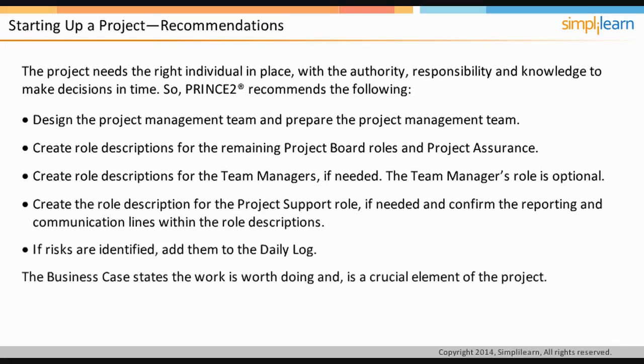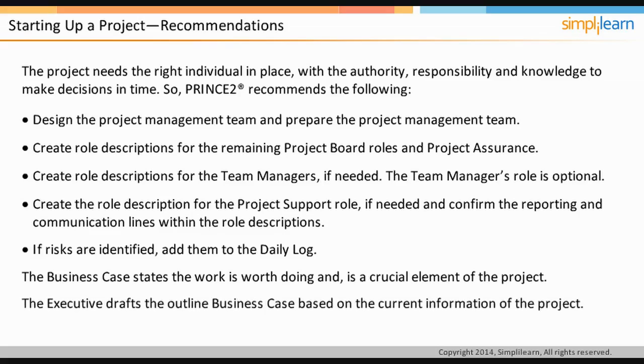The business case states the work is worth doing and is a crucial element of the project. Considering the information available, the outline business case is likely to be only a high-level view at this time. It provides an agreed-upon foundation for a more extensive business case developed in the initiating a project process. The executive drafts the outline business case based on the current information of the project.